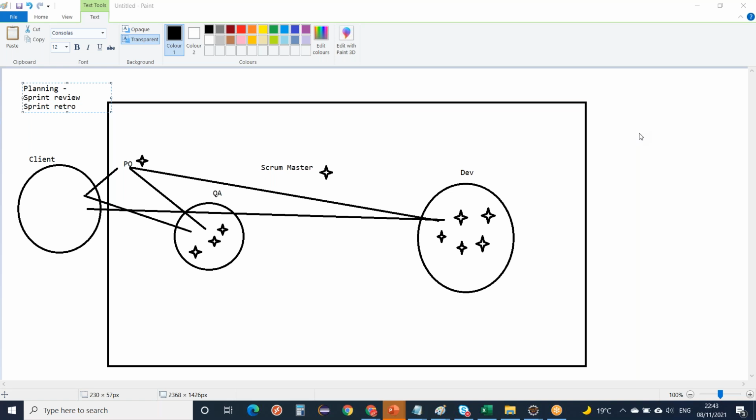What are the meetings we have, or these are called sprint ceremonies? So what are the different ones we have in agile? What are agile ceremonies? The interview question will be this, so you have to answer these. So sprint planning, in this you will be planning the sprint activities. Who all will be involved in it? All. Okay, who all? Developers, scrum master, product owner, and the QA. These will be invited and involved in the sprint planning.